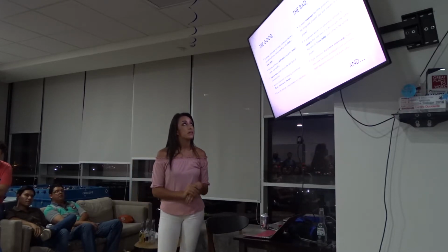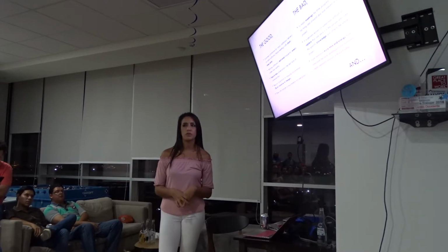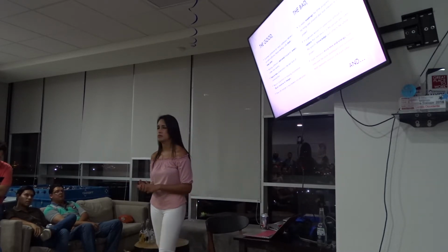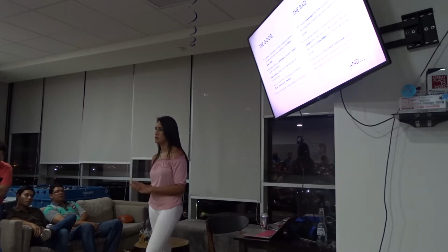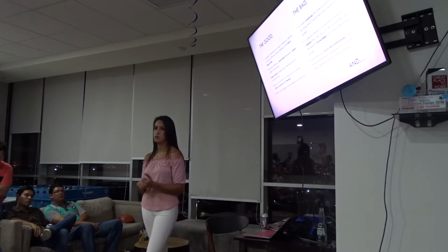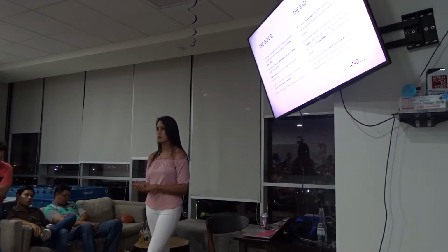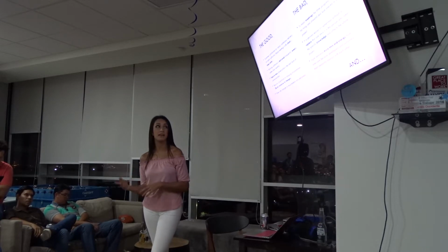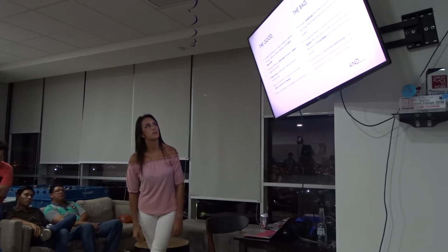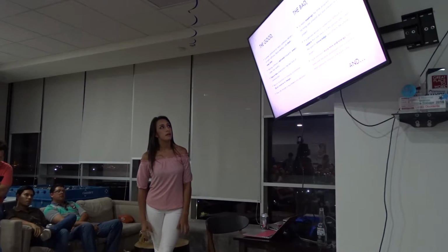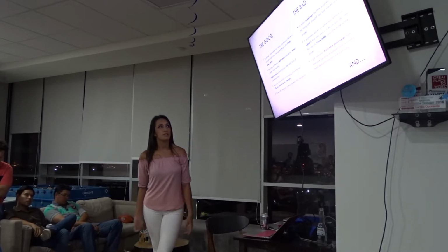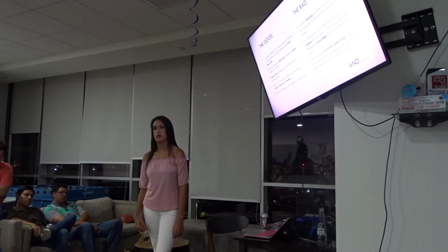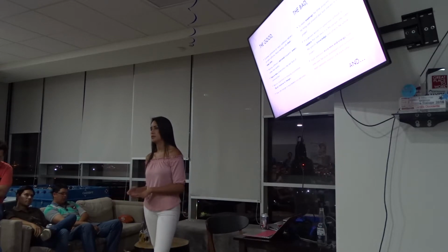Another thing that's good about Agile is that, as I mentioned earlier, it's delivered more frequently. You can work in what we call sprints, and those sprints can be 2 weeks, 3 weeks, 4 weeks at the most. In each of those sprints there's a planning session, but I'm going to talk about that later, a couple more slides on. And also, as I mentioned, there's more face-to-face conversation between the team, the product owner, and the user.